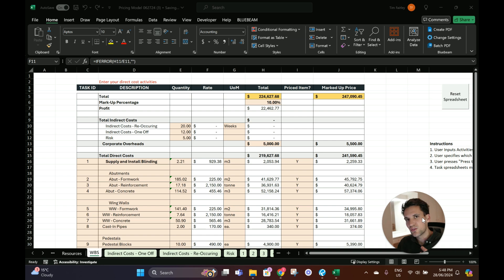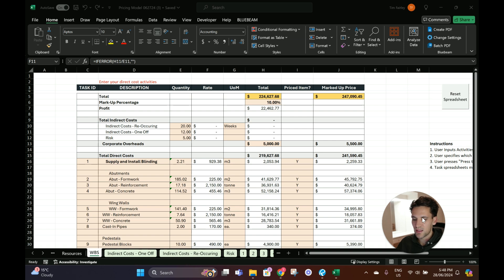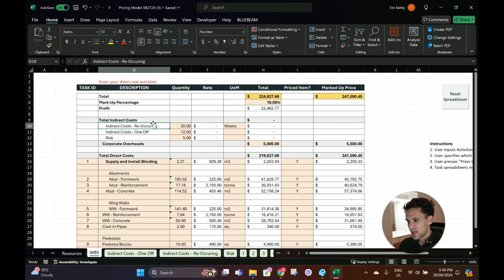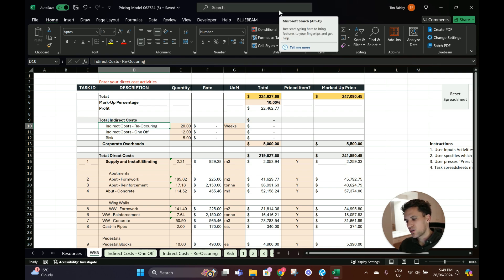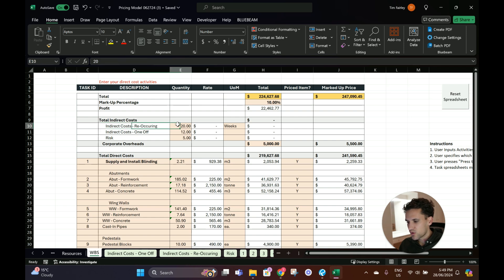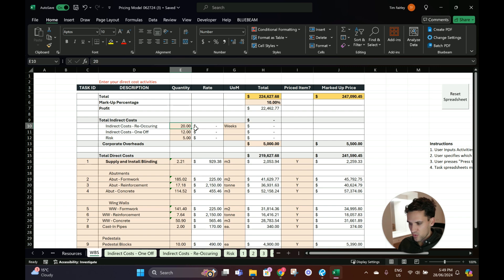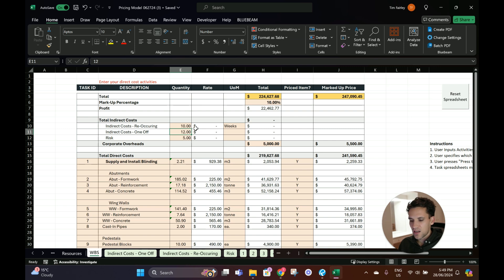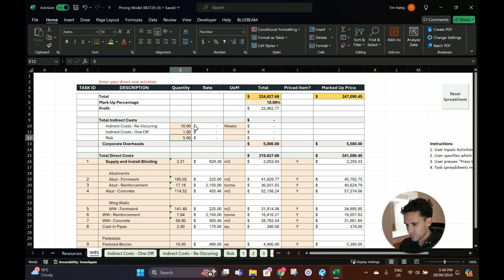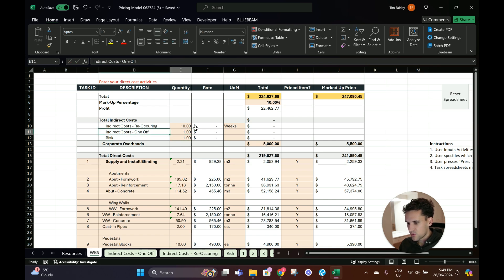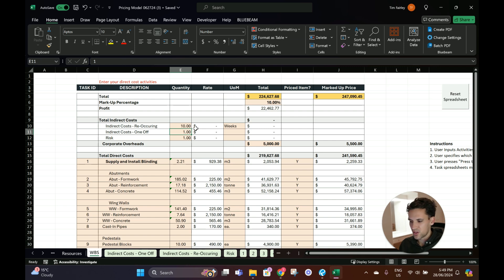If we go back to the work breakdown structure tab you can see all these rates have filled out. We've got $200,000 total direct costs. Now the indirect costs - indirect costs are the costs of supervising, managing, overseeing a project. They're the costs of everything you have to do to do the work but isn't directly related to a billable item. So it might be things like a telehandler, supervision, management, these sorts of things. Indirect costs - we've got our recurring, our one-off, and our risk.